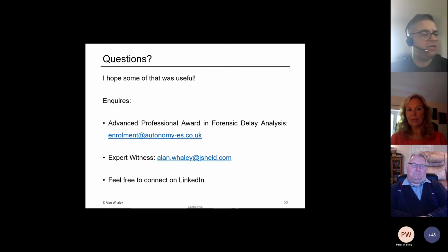So although the NEC is directive to, say, a project manager and a contractor about what they should do, and in the spirit of the contract, I think that the analyst should follow that for discrete issues. Unfortunately, many NEC disputes that actually go that far tend to be highly complicated and for things that haven't been notified properly or even analysed at the time. And in those situations, as we can see from the Northern Ireland case, it isn't appropriate for a tribunal to just look at things theoretically.